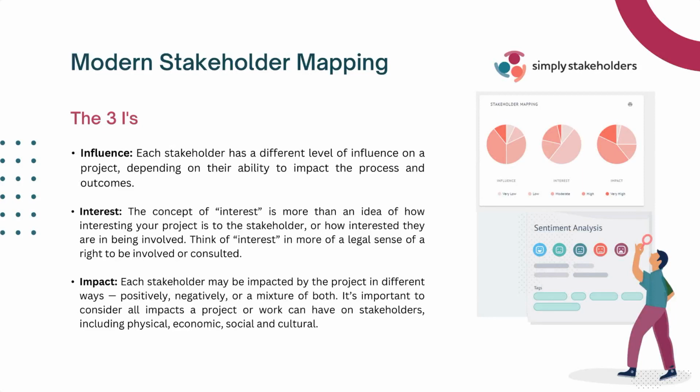A few years back, an oil project was initiated on the Australian coast. They secured all the necessary permits. They got thumbs up from everyone that needed to get a thumbs up from. However, the project planners actually overlooked the importance of consulting with the local residents living on a nearby island. This oversight ultimately led to a legal dispute, which was initiated by the island inhabitants, who felt really marginalized by the lack of engagement. The court ruled in their favor, resulting in a significant financial loss for the project, amounting to millions of dollars.